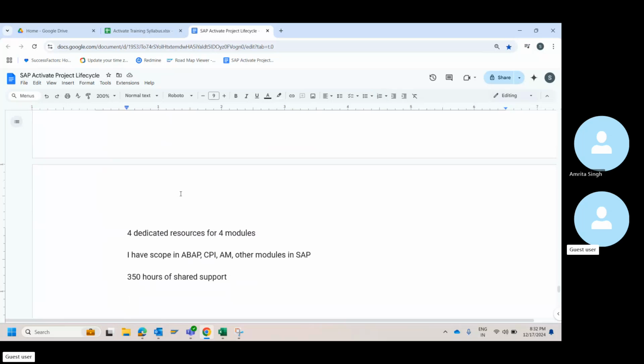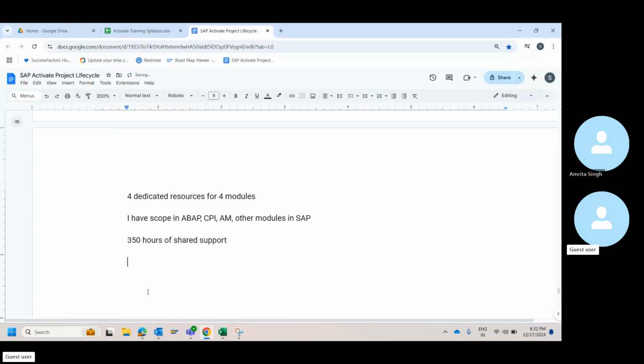If, for example, both of us are developers, and we are both supposed to do a web program, you are assigned an activity by this customer, and I'll do an activity. We both are shared. You cannot bill 160 hours for a month. I cannot bill 160 hours for a month. Instead, you have to bill the hours that you have worked. I will say I have worked 20 hours this month. You will say you worked 15 hours this month.